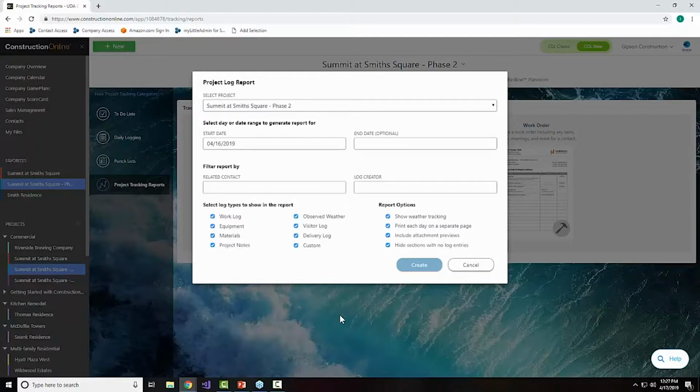And it was something like 4 years after the hotel was built and finished, but because they didn't have documentation and it was still considered in that warranty period, the construction company was responsible for that work, and they didn't have any documentation to prove that they did it right. So again, it fell on them. They were sued for a substantial amount of money, and that company folded. The company went out of business. Of course, that'll happen. It does.